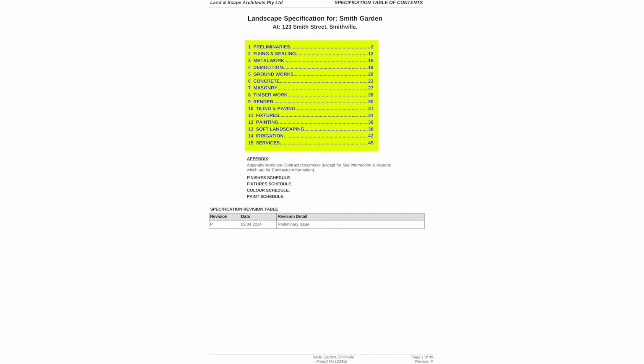The 15 sections should remain in every spec done. This has two advantages. First is project-to-project familiarity. Second, when a section is not needed, it stays but states that it is not applicable, so contractors quickly know what is not in a project without having to do full document analysis.